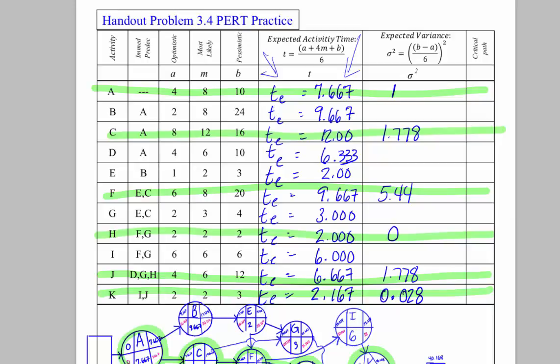So I have the expected time for all of the different activities. And then over here I've computed the variance, and I just computed the variance for the activities that I knew were going to be on the critical path. So I first calculated this column here, then I went down here and I drew my diagram. That was step two. And then I computed it all out. Then I did this. So this was step three, computing the variances because I didn't need the variances for the activities that were not on the critical path.